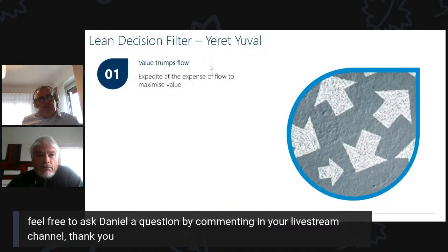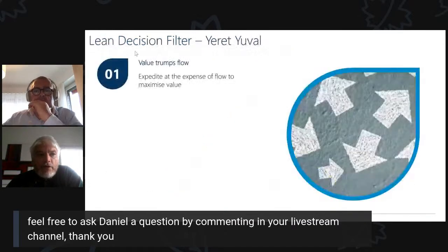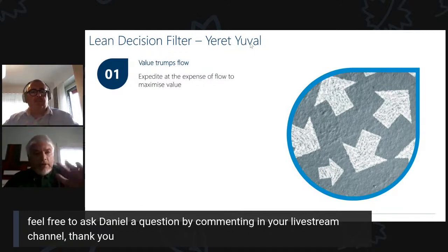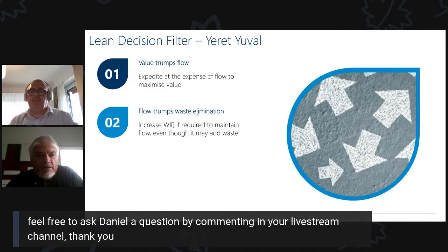Seems reasonable, then. Then we've got the lean decision filter by Yeret. I don't know if I pronounce his name correctly, so I apologize. Value trumps flow. Okay, expedite at the expense of flow to maximize value. That's fine. Flow trumps waste elimination. Increase WIP if required to maintain flow, even though it may add waste.